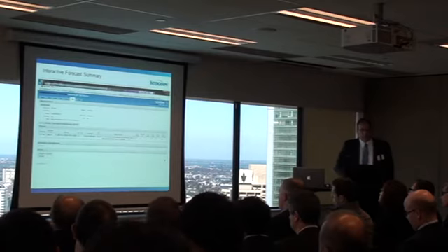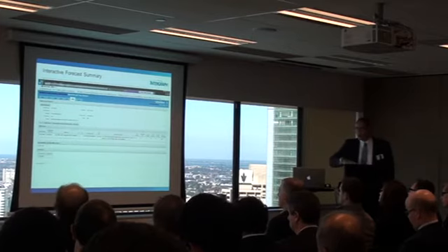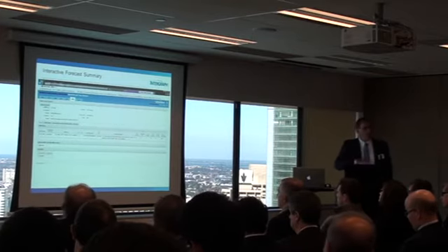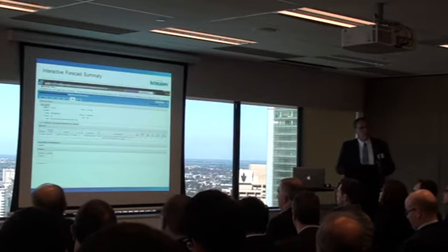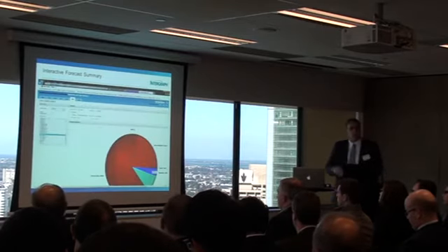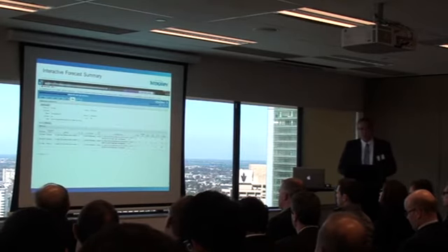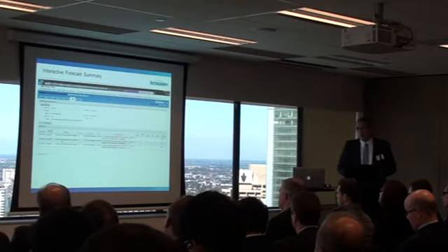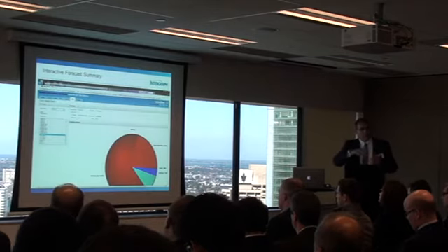So in a very, very easy way, we call it forecasting. Forecasting the material needs. You don't want to get in trouble tomorrow. You want to know the forecast over the next, let's say, 3 months. Is the materials management supply chain in sync with the construction sequence? In sync of the material needs? Because you don't want to buy anything today and then get it delivered tomorrow. You want to have it also kind of in a certain way, right?